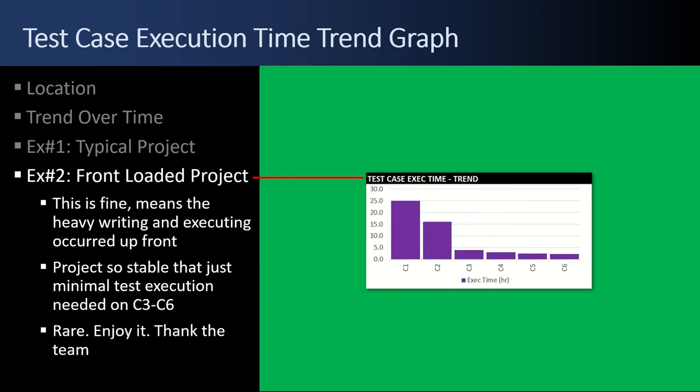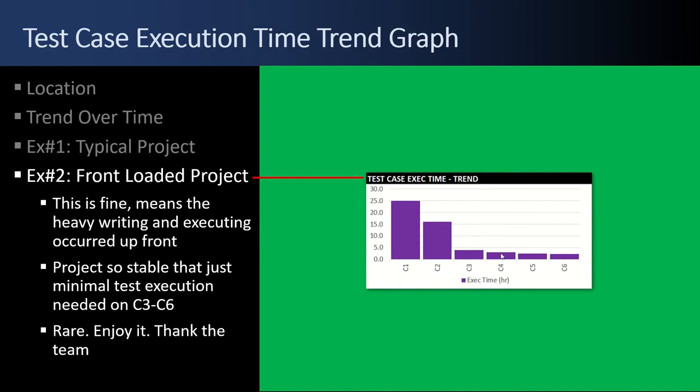Example number two, a front-loaded project. This is a good project. It means that there's heavy writing and executing of test cases up front in cycle number one, 25 hours. Then cycle number two, it dropped to 15 hours and then you got uber efficient. It's nice to see a front-loaded project. You've tackled the risk up front and things are smooth on the tail end. It's rare. Enjoy it. Thank the team for doing a good job.